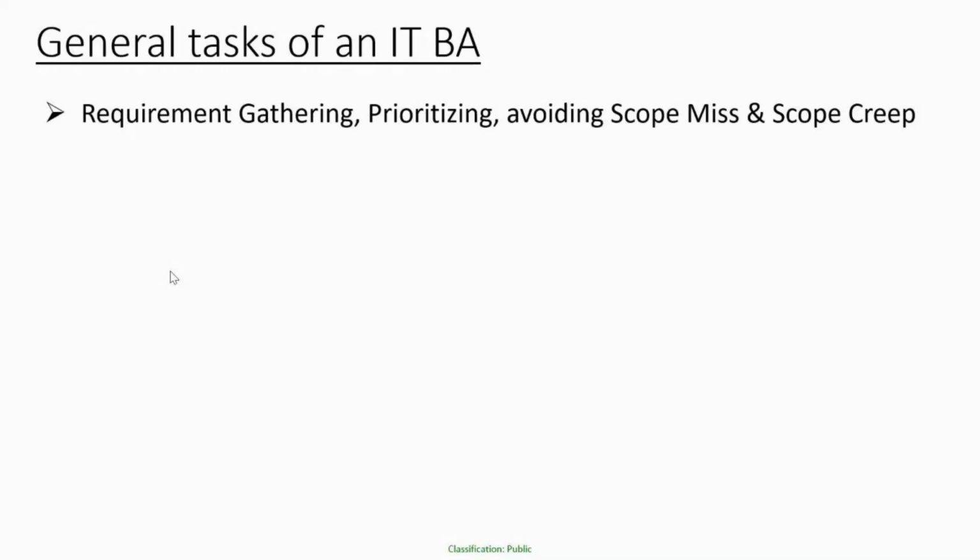The second thing could be that there could be a lot of words of English which are used in the app which do not have a direct translation into the local language. Maybe it could be a single word in English which requires 4 or 5 words, or a complete phrase in the local language, which indirectly means you have too much text in a single screen wherever such things happen. Now these and all will involve the design team to relook into how to make it happen. Maybe additional screens have to be developed. Maybe the text has to be redefined properly. So this is increasing the scope of the project, increasing the efforts involved in it, and thereby the timelines going into implementing it. So this is a classic example of a scope creep. Okay, so as a BA, you must try to ensure that you can avoid this scope creep as much as possible.